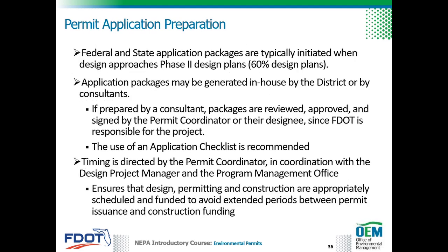Federal and state permit application packages are typically initiated when design approaches Phase 2 design plans at 60% design plans. Application packages may be generated in-house by the district or by consultants. If prepared by a consultant, packages are reviewed, approved, and signed by the permit coordinator or their designee, since FDOT is responsible for the project. The use of an application checklist is recommended.